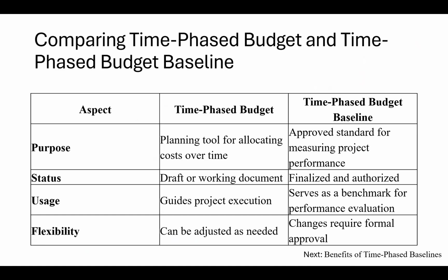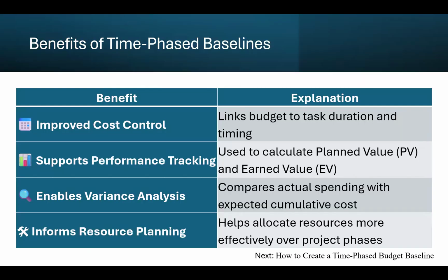But the time-phased budget baseline, since it's been standardized, authorized, before you make a change, you must receive approval. Benefits of time-phased baseline: improve cost control, supports performance tracking, enables variance analysis, and it informs resource planning.